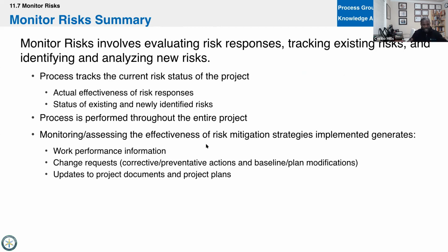A couple days later, we come out to assess the damage, and we notice some of our sandbags broke. Now we have sand in the drain. So the risk is flooding from a hurricane, the risk response is putting sandbags out. And then as we track that risk and analyze its effectiveness, the response was effective in keeping water out.